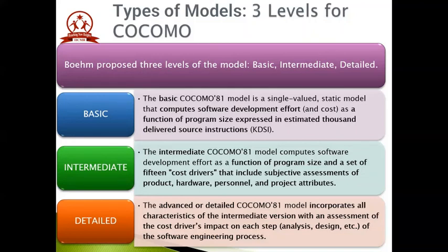And the detailed COCOMO model additionally accounts for the influence of individual project phases, that is, it accounts for these cost drivers and also calculations are performed phase-wise, henceforth producing a more accurate result.